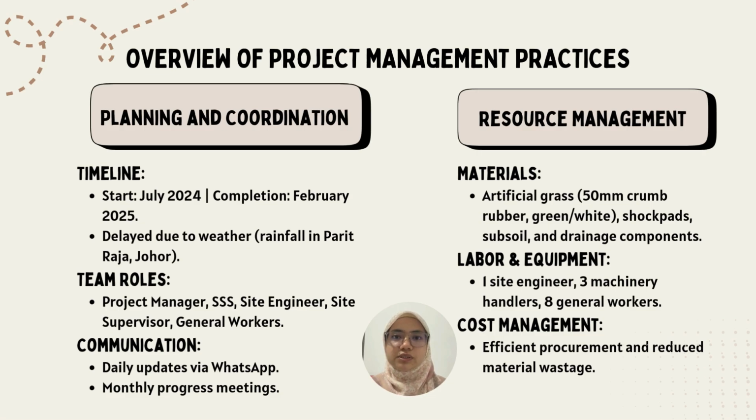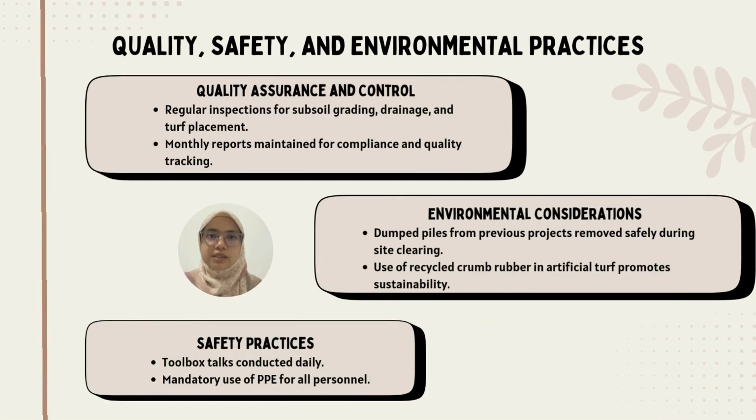The workforce consisted of 1 site engineer, 3 machinery handlers, and 8 general workers. Efficient procurement strategies and minimal material wastage help maintain cost efficiency throughout the project. Now let's move on to quality assurance, safety, and environmental consideration.